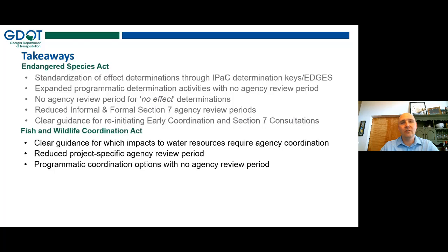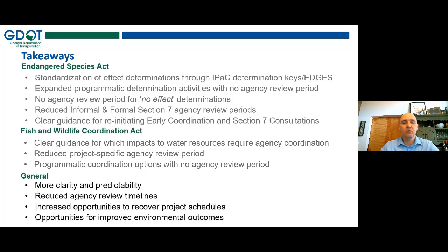But more importantly, and this is really something I can't stress enough, we have that programmatic coordination option with no agency review period. And they may ask the exact same thing through project-specific coordination, and then you've just added time onto your project schedule. So it's something you really want to consider on each of your projects as you're trying to keep those project schedules on time. But in general, we've got more clarity and predictability in our process.